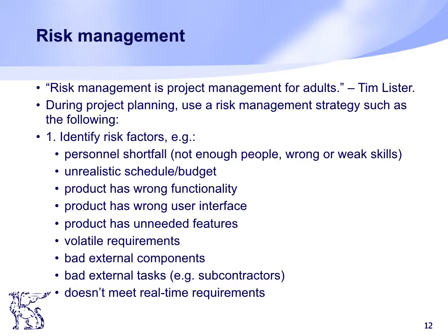Now let's talk about known unknown risk. Known unknown risks are those risks that the project team is aware of, but it is unknown whether such a risk exists in the project or not. For example, if the communication with the client is not of good level, then it is not possible to capture the requirements properly. This is a fact known to the project team. However, whether the client has communicated all the information properly or not is unknown to the project. So these kinds of problems are called known unknown risk.